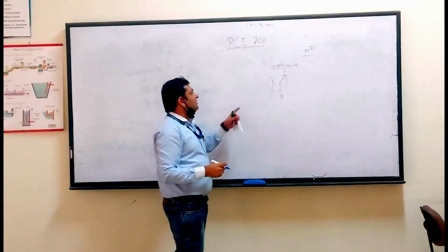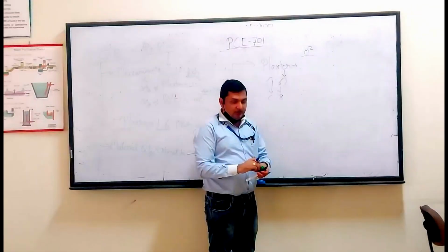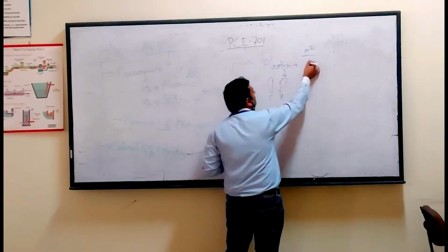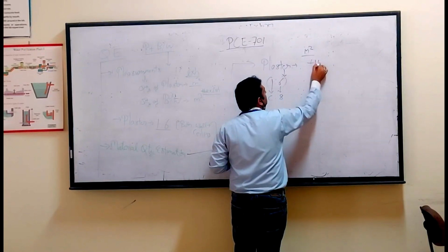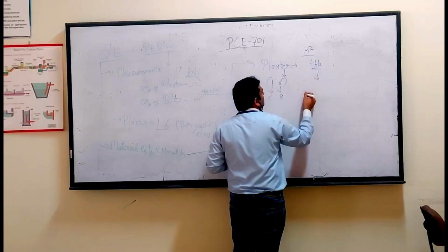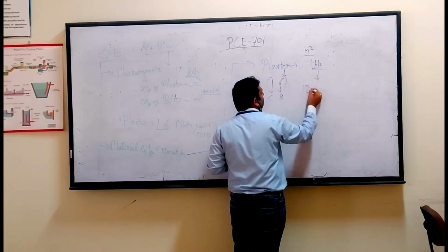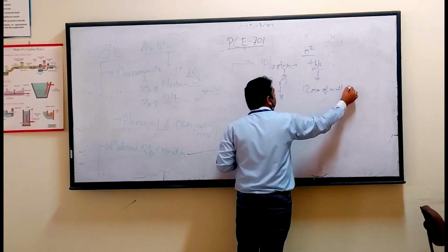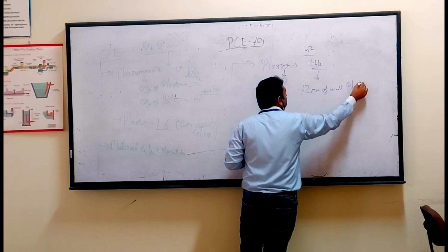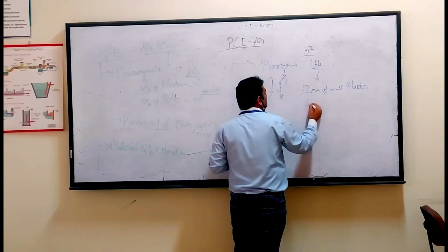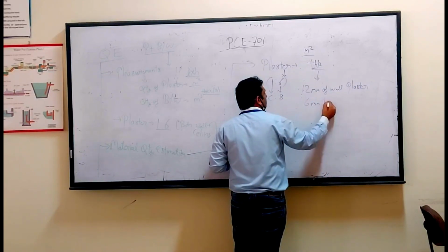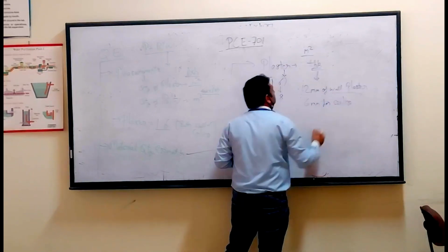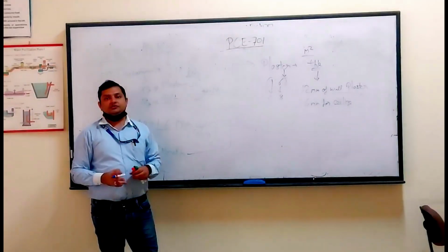Now, to get how much cement and how much sand you have to order to carry out the plastering of the lab, we require one more dimension, that is thickness. You will be taking a thickness of 12 mm for wall plaster and a thickness of 6 mm for ceiling. These will be the thickness dimensions we will take for the plaster.